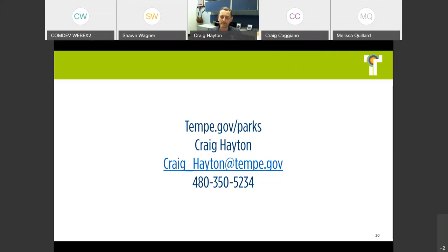Question about projected timeline for final idea selection and RFP issuance: after the council presentation in early November, Craig anticipates providing recommendations to mayor and council to get their input, then beginning the drafting process. He expects late 2020 or early 2021 for the RFP to be advertised, working to get as much information out as possible in a format similar to how the RFI was conducted.